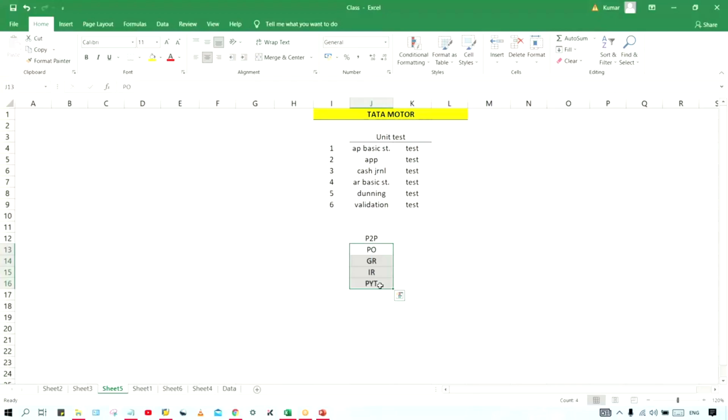After that, it is going to be approved by a particular authority, maybe a senior manager. Once the requisition is approved, the next step is to invite quotations from different vendors for the same materials, so that everybody quotes their prices, per unit or per ton, whatever unit of measure there is for that material.